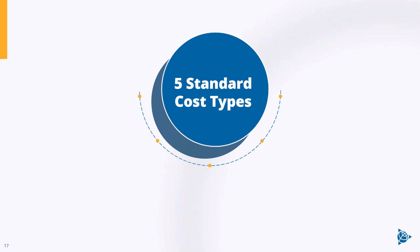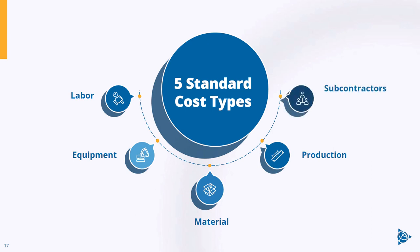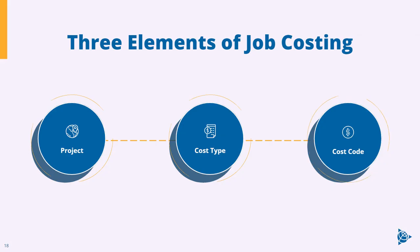There are five standard cost types in the construction industry that almost every company will use: labor, equipment, material, production, and subcontractors. Depending on the type of company, there may be additional cost types. For example, a home builder might talk about an allowance, and a civil contractor may break equipment into two categories — owned equipment and rented equipment. There will be variations, but these five cost types are standard for all construction companies.